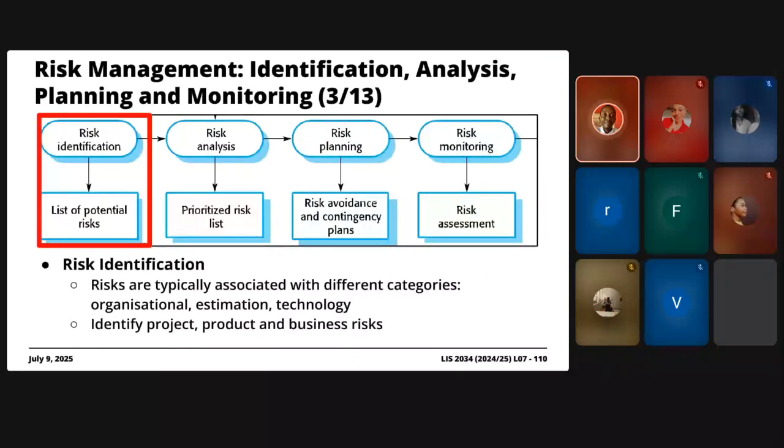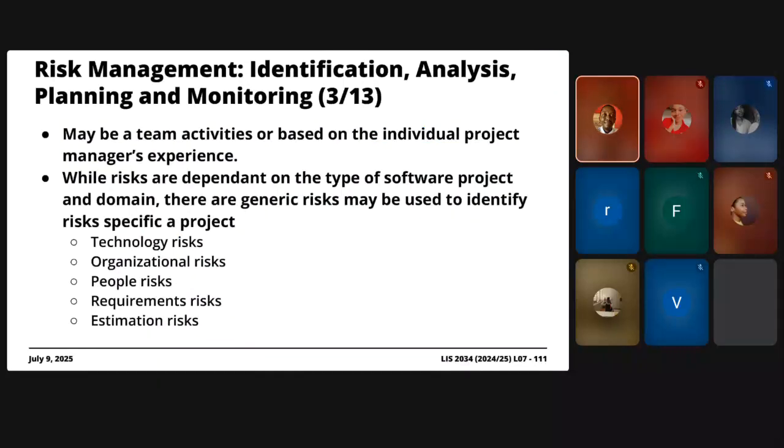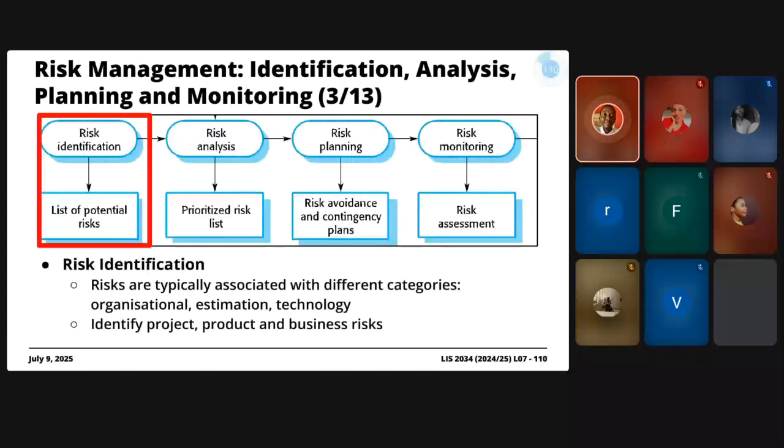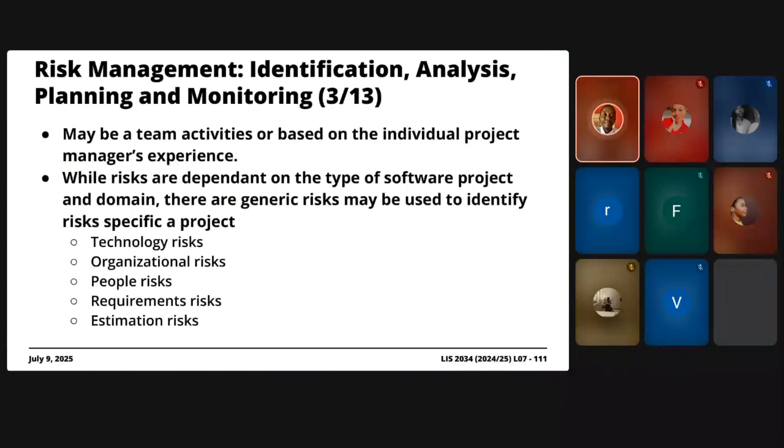And so we see here that as part of risk identification, all you're doing is sitting down as a team, and this is what you're going to do by Monday. You sit down and you identify everything that can go wrong in your project. And then you figure out exactly what it's going to be affecting. It's not a difficult thing to do, although sometimes it's easier for somebody like me who's been doing this for a long time, because I'll use my intuition and my experience. But the things that can go wrong can be viewed as things that will affect the research itself, the management of the project, and all those things.